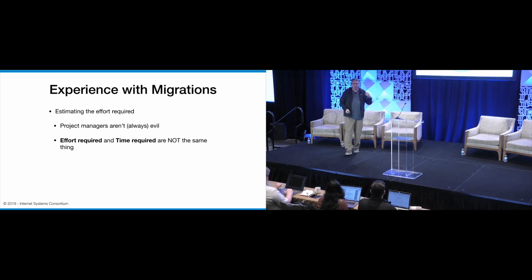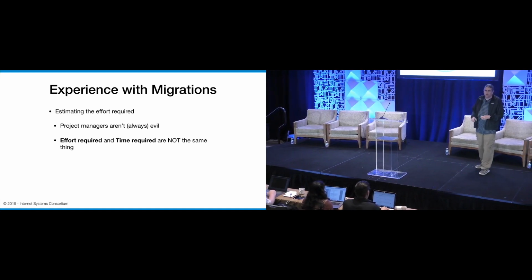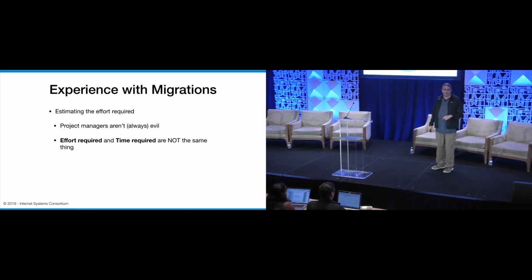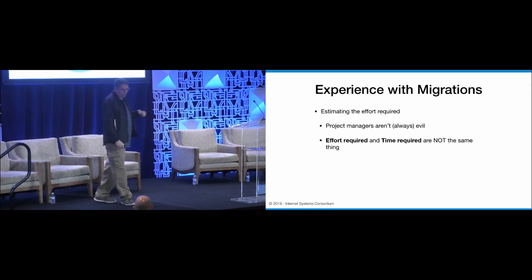The effort's going to be, well, first of all, we need to decide that, yes, we're actually going to do this migration. Followed by, well, what does our existing configuration actually do? How does it work? Then you're going to have to peel off the layers and make the configuration actually work in the new product. That's going to take a lot of time. The additional piece where the time comes in is actually getting the work done. If you have a multinational organization running across multiple continents, 3 o'clock in the morning here on a Saturday may not be the optimal time to do that upgrade if you're somewhere else. So be aware that the effort is going to be huge. The time is going to be a lot longer than you actually expect it to be.